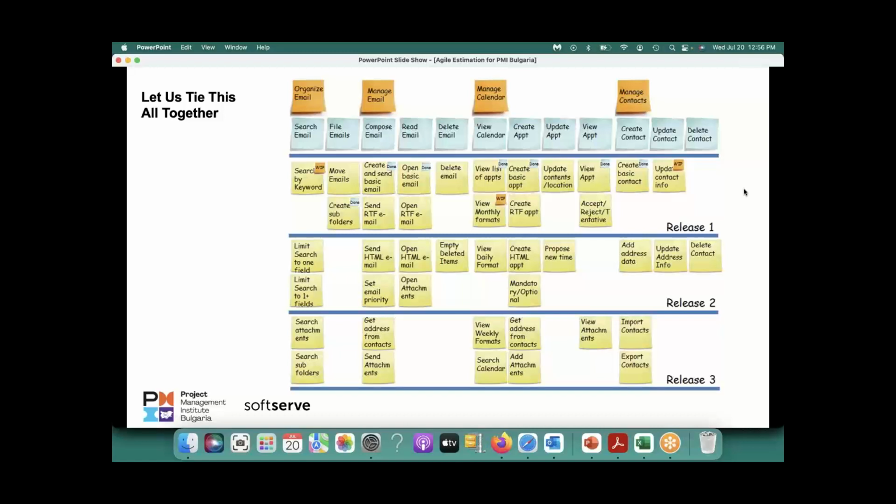You'll say, okay, this project will get extended by another 2 months, and the cost is now $600,000, and the time is now 8 months. That is what will happen in waterfall. But in Agile, 6 months are over, $500,000 spent, you got 40 things, and you did not get 40 things only at the end of 6 months, you started getting them even sooner.